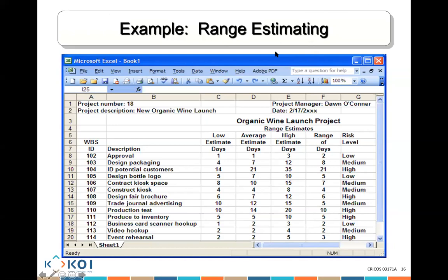All right, sir. Thank you. Does that make sense? Sir, can you show us the formula? I'm going to put it for you. So it's 1 multiplied by the optimistic, plus, I'm just going to type it so that everybody will be able to see it, plus 4 multiplied by the most likely, plus 1 multiplied by the pessimistic, divided by 6.